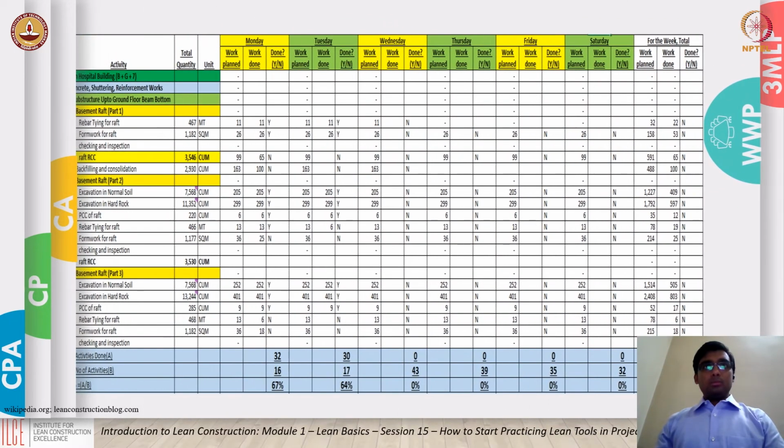Then comes the weekly work plan. Creating a reliable workflow depends on work being released based on downstream demand. Lean construction recognizes that it is best conducted through those that are performing the work, which are often subcontractors. Participate, communicate, and collaborate closely with each other to determine the schedule of tasks.